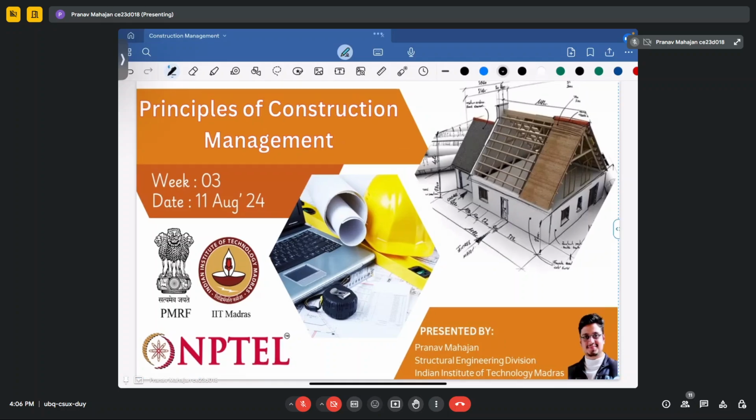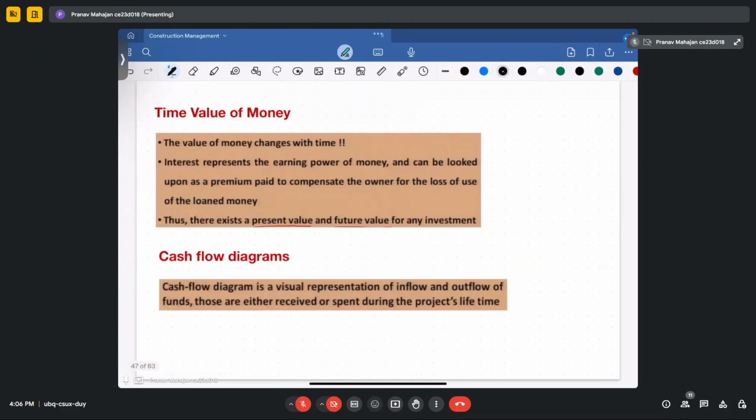If you recall from the videos, in this week we started with the construction of the RA bills. How do you make the RA bills? You describe the different quantities involved in the actual construction, not the estimated quantity present in the bill of quantities, and the rate should be as per the rate awarded to the contractor in the contract agreement. So the actual quantities involved during the construction work were taken into account in RA bills.